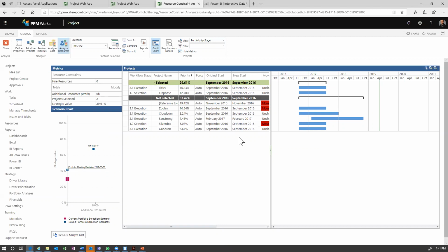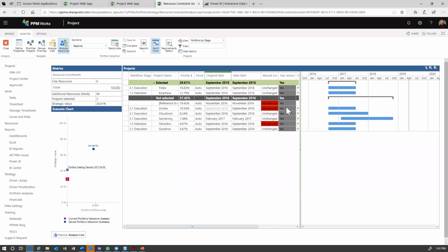Well, right now, folks, this is going across both projected work, meaning all these projects, as well as existing work within the system. So if we had asked for 25% project manager, it's looking across the project manager role, across all of our current projects and saying, can we add in 25% more of a project manager for this project during this given time frame? And you can see right here, July through July, or whatever happens to be here, okay? Is that possible? And it's saying, no, we can't. We have over allocations. We can't do any of that.